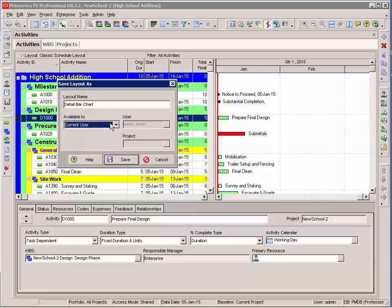If it's a specific layout for just this project that I wouldn't use in other projects, I would save it as a project layout.